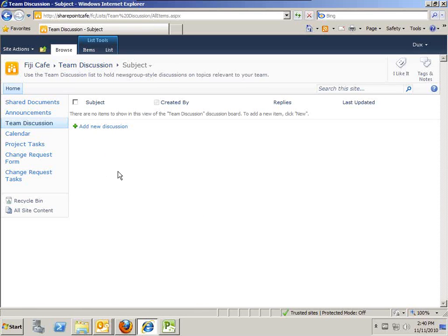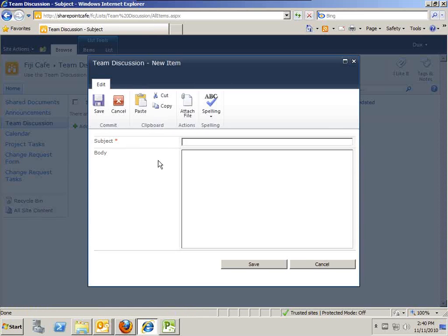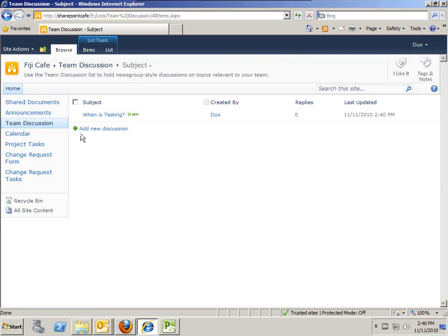Here's something I propose. If you're doing any collaborative work, in lieu of email, what about using a discussion board? And I'll explain why. So, for example, I have a question: when is testing? For this project, Fiji Cafe, I said, when is testing? So what I'm proposing here is you create a standard, a process, a rule for your project team and say, okay, for this project, whenever you have a question about the project, don't email. Go to the project site, establish a new discussion.